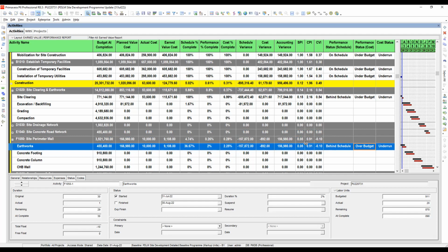Since the SPI is absolutely not reliable due to the owner's delay, we have two choices here: whether to adopt the remaining cost, which is the one we just executed in estimating the remaining cost of our project, or to use the CPI.